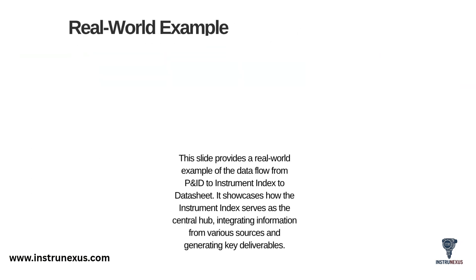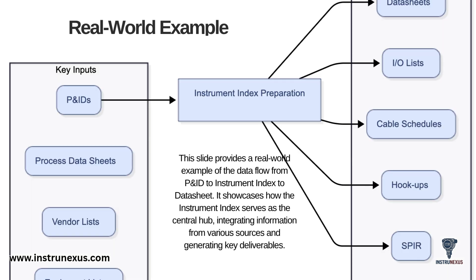Let's visualize this with a real-world example. It all starts with the P&ID — a new instrument tag is added. That tag is then entered into the instrument index, which serves as the central hub. In the index, it's populated with all its data: process, mechanical, electrical, and so on, integrating information from all those various sources. From that single entry in the index, a data sheet is generated, an I/O list entry is created, and a loop diagram is drawn. This flow — from P&ID to central index to all other deliverables — is the core concept. The instrument index is what makes this powerful integration possible.